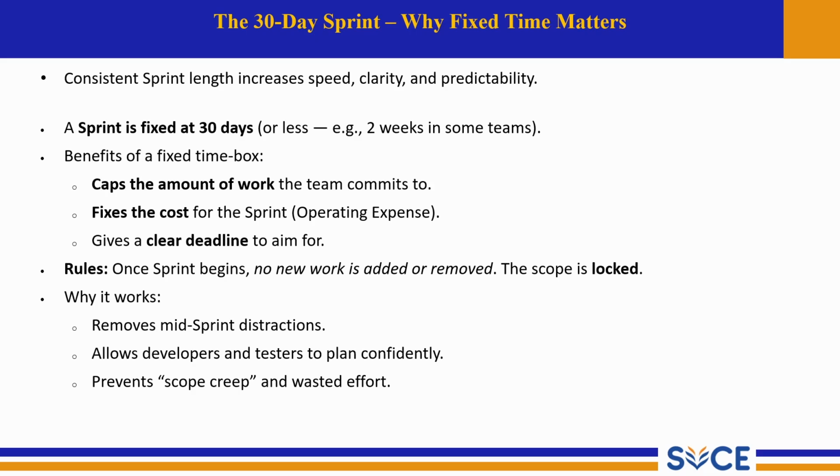A sprint is fixed at 30 days or less. Example, 2 weeks in some teams. The benefits of a fixed time box: it caps the amount of work the team commits to, fixes the cost for the sprint, that is the operating expense, and gives a clear deadline to aim for.